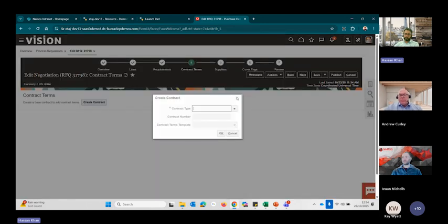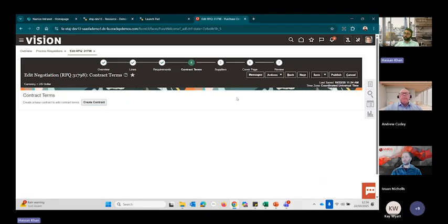This is a place where sourcing links with contracts as well. Because I know that after this sourcing is completed, I need to create a contract with the supplier before I can actually start procuring from them. So I'm going to create a basic draft structure of the contract right now, and send this contract to my suppliers as a draft, just to give them an overview that after the negotiation process, if you are awarded this negotiation, then you will need to enter into this kind of contract.